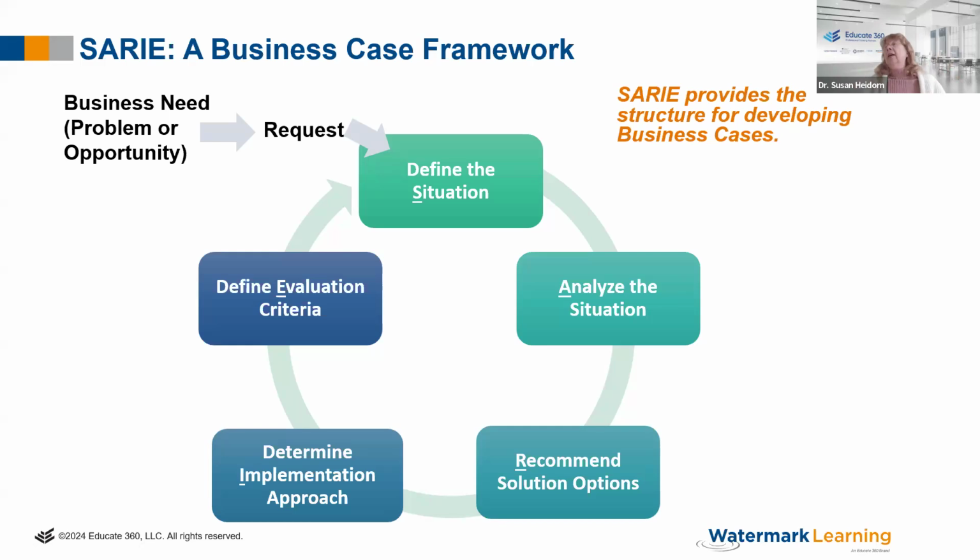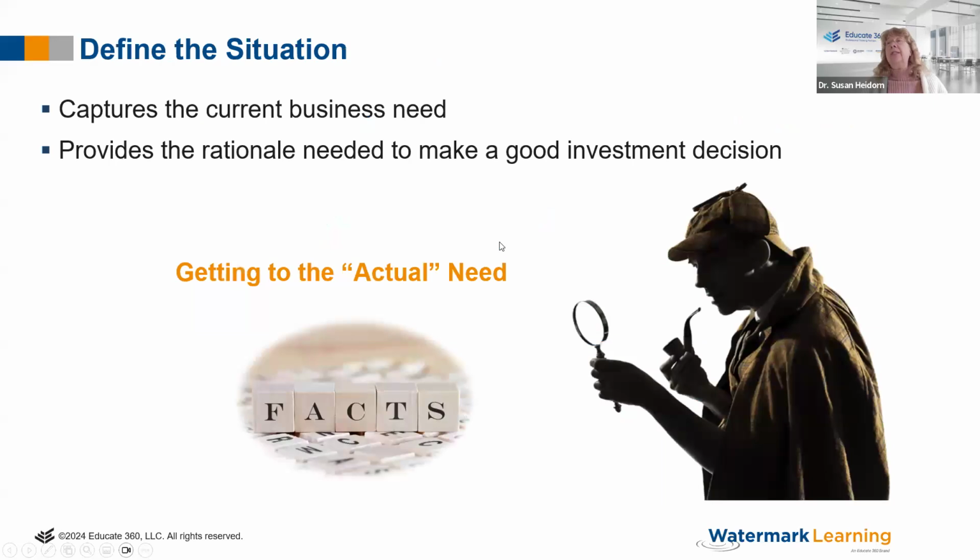So SARIE stands for understanding the situation or defining the situation, analyzing the situation, recommending solution options, determining implementation approach, and defining evaluation criteria. So the first thing is defining the situation.